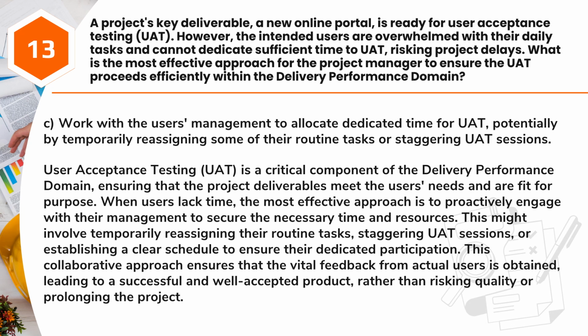and resources. This might involve temporarily reassigning their routine tasks, staggering UAT sessions, or establishing a clear schedule to ensure their dedicated participation. This collaborative approach ensures that the vital feedback from actual users is obtained, leading to a successful and well-accepted product, rather than risking quality or prolonging the project.